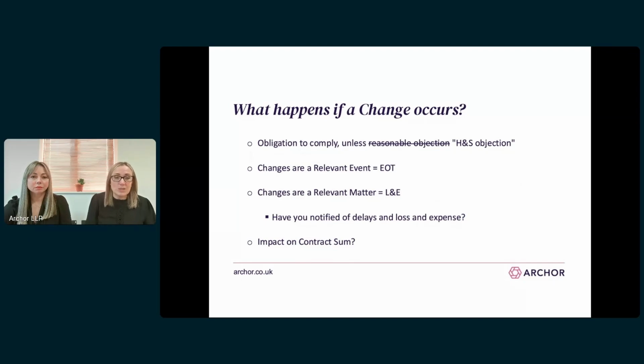So once you've established whether compliance is compulsory, it's then important to note that changes are both a relevant event and a relevant matter under all of the JCT suites. And this should never be amended, even if the contractor is taking full design risk under a D&B. Contractors do, however, need to make sure that they've properly notified of these relevant events and/or relevant matters within any stipulated timeframes as set out in the contract.